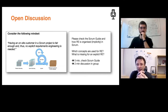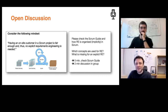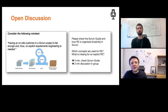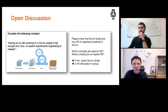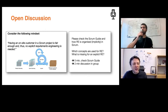The product owner is the one closest to the role of a requirements engineer — mediating between the customer and the team, sometimes via the Scrum master. Requirements are specified in the form of user stories and captured in the product backlog, which serves as a source for planning the actual sprint and implementing those requirements in the respective sprint.